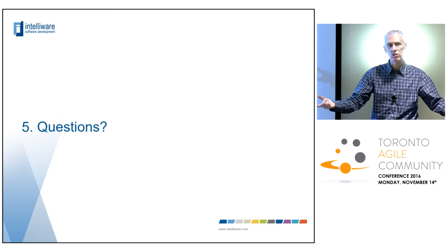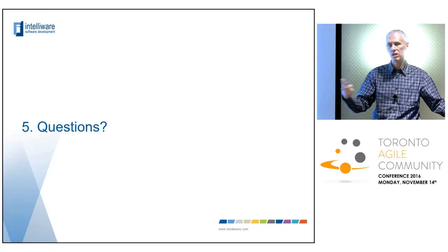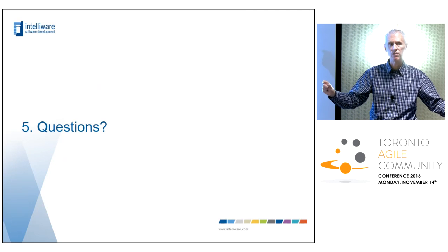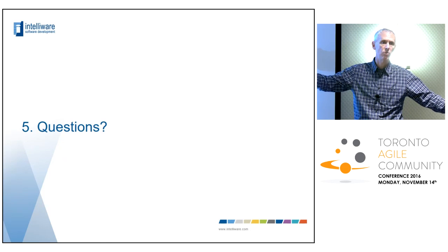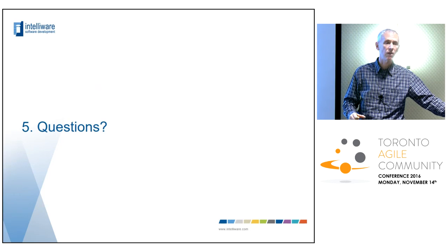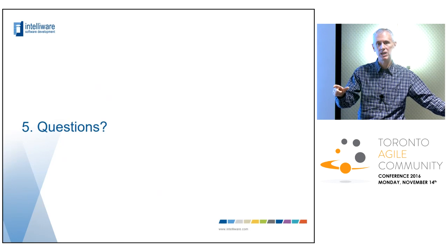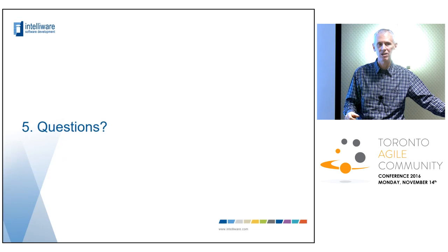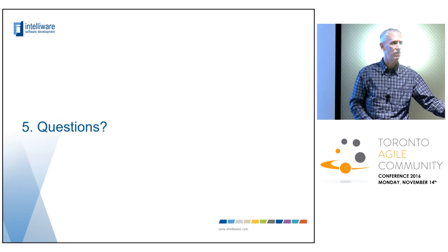Okay, you told us to do this, we did this, it doesn't work, we're going to need to do that, so we're going to add a new story for that, but something's got to change in the scope. Something lower priority is going to come off, or we can leave it like this, because you don't want to take something off the backlog. Right? You need to be able to move the scope lever.